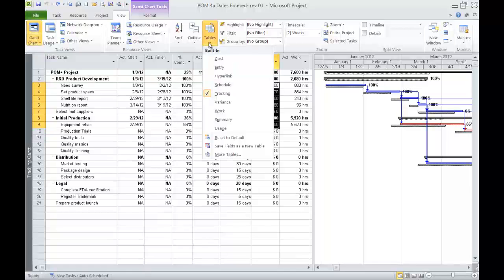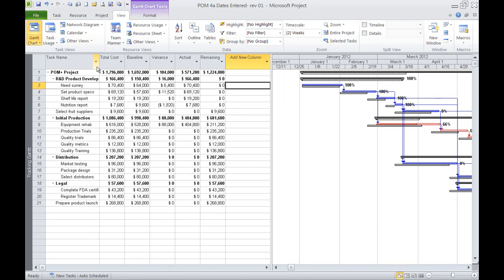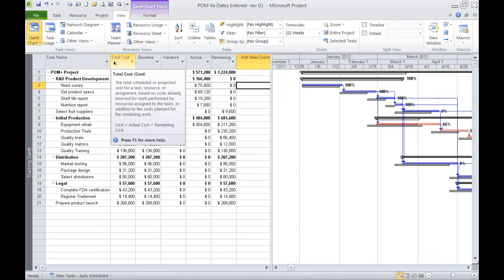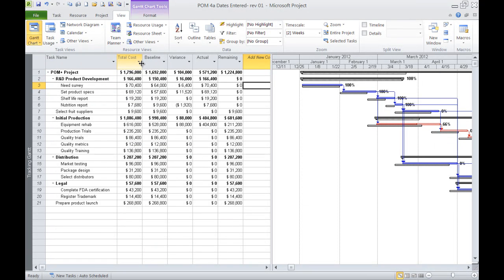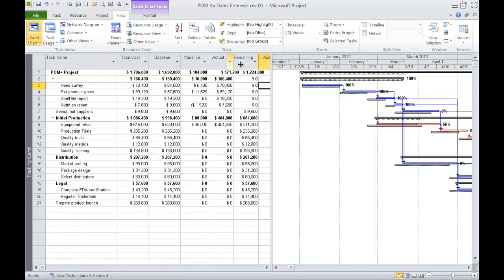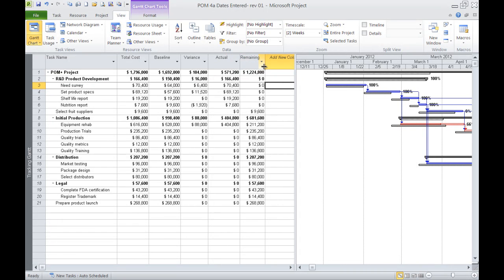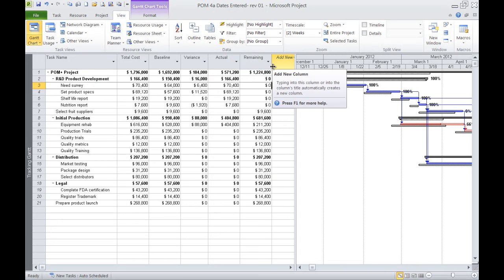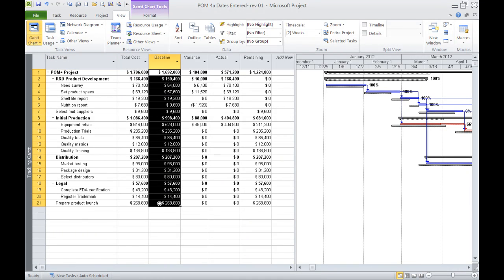We're going to switch tables, and we're going to come to cost. And I'm first going to say that this is based on dollars. It's not based on earned value, and we'll have a separate discussion on earned value shortly. Understanding that the two, although they relate to each other, you can't mix the terms. So let's take a look at our baseline budget, which was $1.692 million, right? And that was based on the original labor man hours at the task durations we established.